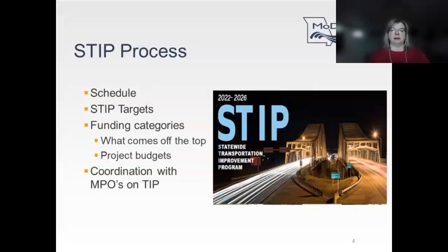The districts are allocated funds according to the commission-approved funding distribution formula for asset management, safety, major bridge, and system improvements funds. To manage each district's share of the funds, transportation planning maintains balance sheets that are populated with each district's target amounts distributed for these funding categories.